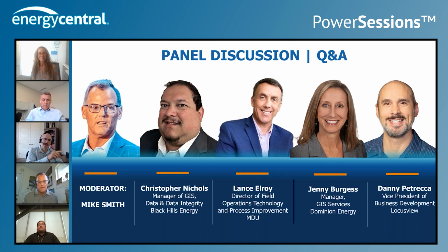I'm glad you asked that, because as we were talking about the GIS data accuracy thing, I said that this ties into undergrounding. So the first piece is a lot of the feedback we get from electric utilities is, accuracy for as-builting isn't so important because it's all overhead. I can just drive around, and if it's not on this pole, I look down the street, it's on that pole, it's fine. Not with undergrounding. Undergrounding, you're almost becoming like a gas utility. More and more of your infrastructure is being undergrounded. So that need for accurate location, but also accurate asset information is important, because once you throw that last shovel of dirt on the trench, I don't know, was that 4-aught we put down there? Well, I can't look on the pole anymore. It's down there, and where is it?